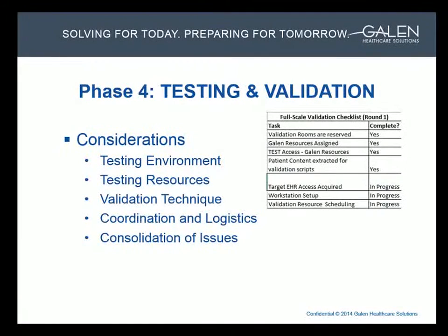We recommend involving a wide range of testers to validate the converted data. We suggest, especially with large or full-scale testing, that the end users, or at least the clinical users, be included in the validation. A client may also want to involve their IS resources and managers in the testing. Overall, it's important to include people who are familiar with the data and the workflows in the target system. This is also a great way to start the training with the end users. If they're validating data in the new environment and they haven't used it before, they'll be able to actually see what the data will look like and begin to get familiar with the new EHR.